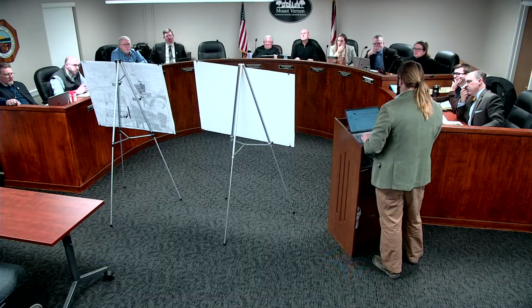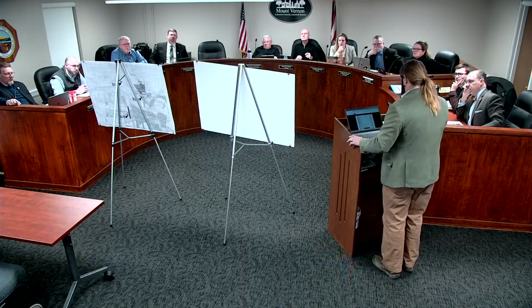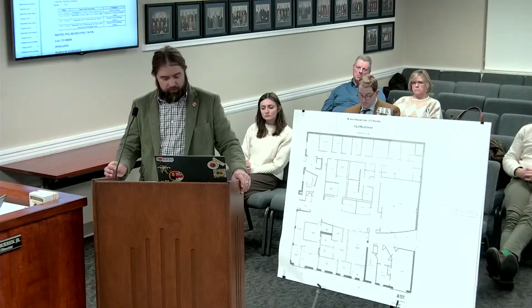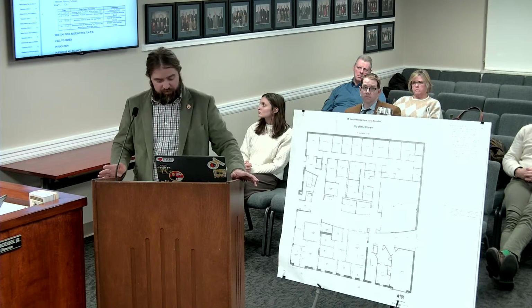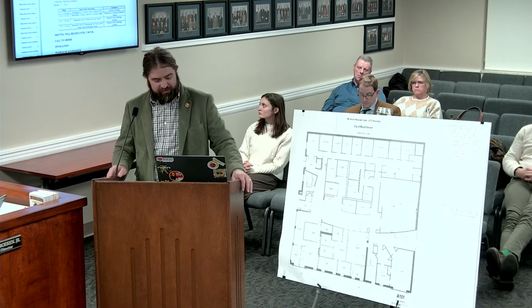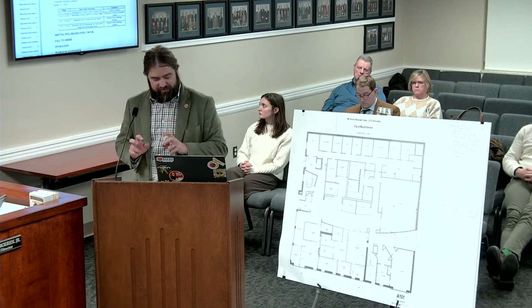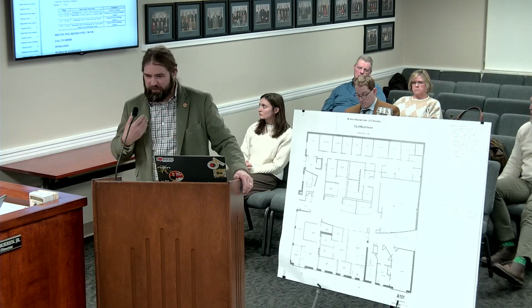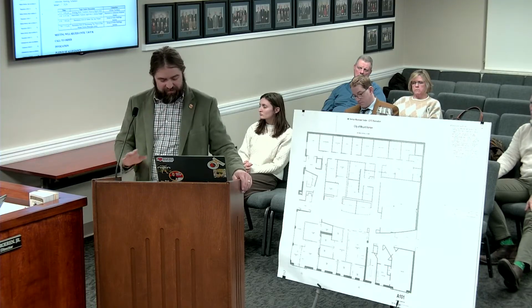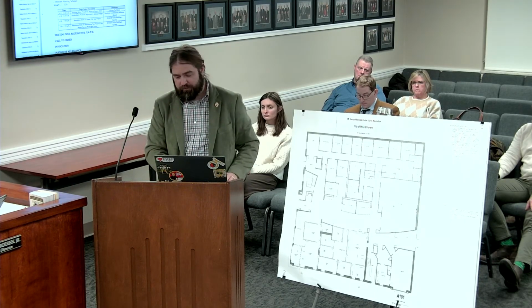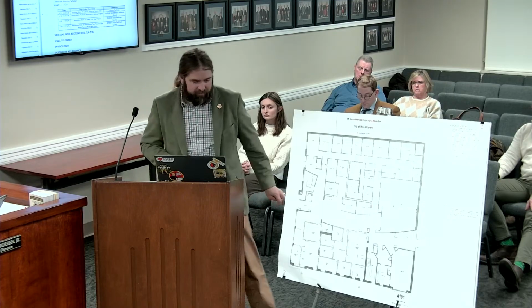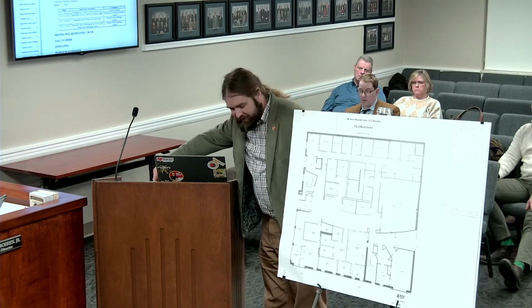Yeah, give me one second, because you're going to want to know. This is at an architect level, so without any contingencies or inspections, we are at about $850,000. The architect at this point wants me to have an 8.7% contingency and a price escalation, which is not a word I use, but that's an architect word. That puts us slightly over $1 million with their safety factors, but we are pushing a 90% set of plans.